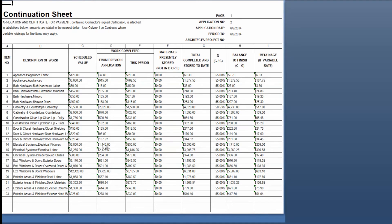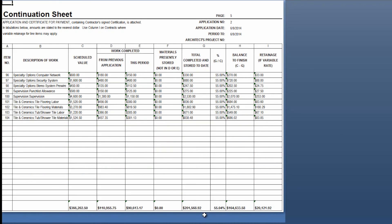On this G703 the only thing that you'll notice will really be different on the second, third, and so on applications is you will now have a previous application column which will total the invoiced amounts from all of the previous applications for payment, so you can compare that to this period and then get the total completed and stored to date. In this case we have 55% complete because we had a 30% stage payment and then a 25% stage payment. You don't have to do this in stage payments — you can invoice for whatever amounts you would like — but it will show the total percent complete from all previous applied invoices. You'll then have a balance to finish and the retainage withheld, and again if you go to the bottom you can see the totals of all of these columns.